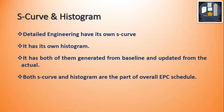Like other schedules, the detailed engineering schedule itself has its own S-curves and histograms. It has both, generated from the baseline and updated from the actuals. This is used to evaluate progress, and actuals are fed in as the project progresses and the schedule is updated.